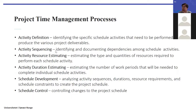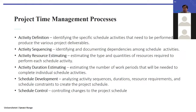After you define all activities, you need to create an order between them — decide which one you do first and which will follow. Then comes estimation: you see who can work on the activity, how long it can take, and how much it costs to complete. The estimation covers the time, durations, and resources. Then you start visualizing your schedule and put it into control when the project starts.